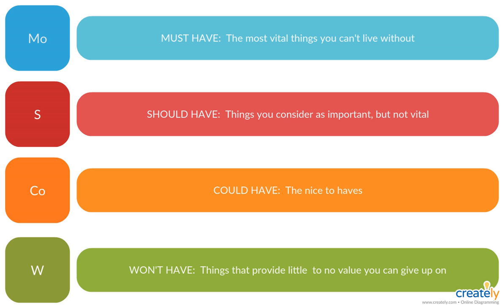But the problem with stopping there is it doesn't give the team enough information on what they need to do day to day to be efficient. So there's a second step: again, on a continuous basis with our product owner, our customer, we order the backlog items within each of those priorities. We review those, and the order tells the team what to do first. This ordering can be based on business or technical constraints. For example, we may need to build out some development environments before we can start creating the first build. Those two steps are the key we use to bring this concept of art of the possible to the project.